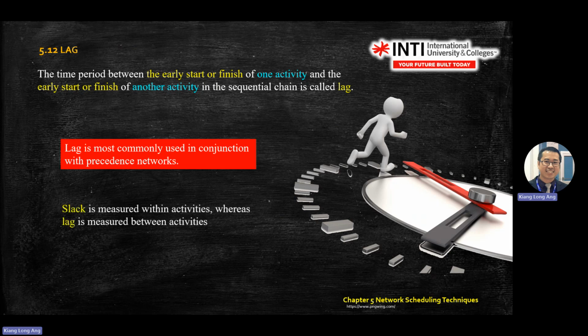Lag is, okay. Lag and slack, the difference is slack measures within activities, lag measures between activities. So the time between the early start and finish of one activity and the early start or finish of another activity is sequentially called lag.